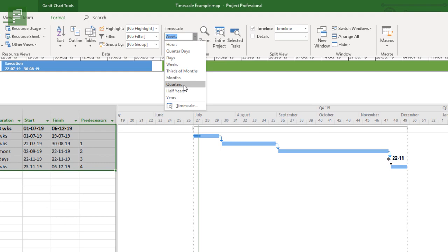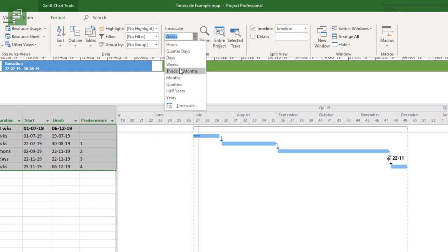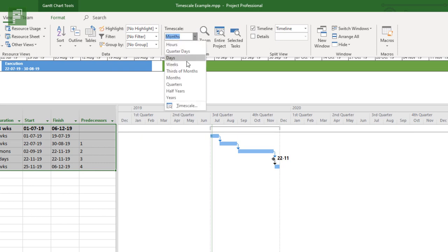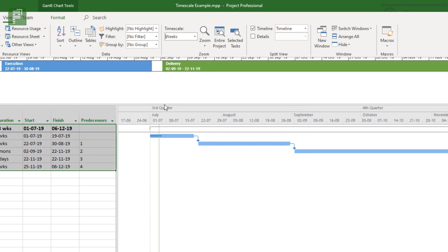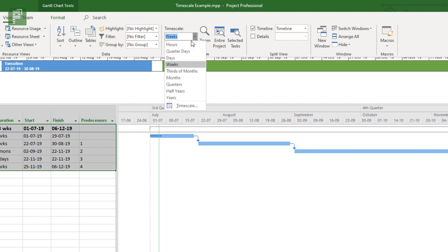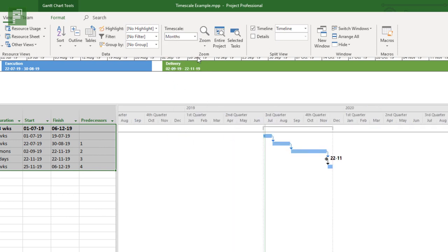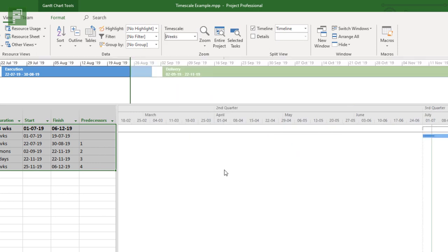And that is if you change the timescale here or on top or you use the zoom option, you will lose this time granularity. Let's do that. I can change this to other, there's these really neat. If you go into view, there's a timescale here. That's quite new. If you go into months, it changes everything here. And if you'd return to weeks, it doesn't return to the weeks that you have set yourself. So that is a little tricky to have in there.